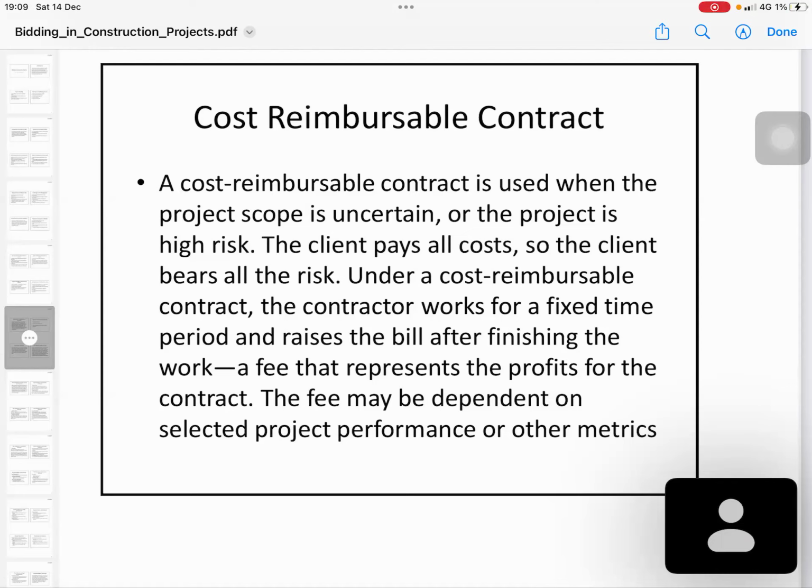So you also don't know the proper detail. So we wanted to go for the cost reimbursement contract, because we don't know what the actual cost will be, what material you want. We can do whatever you require, but it depends on the samples and things like that. So we can't give an exact price at the bidding time.